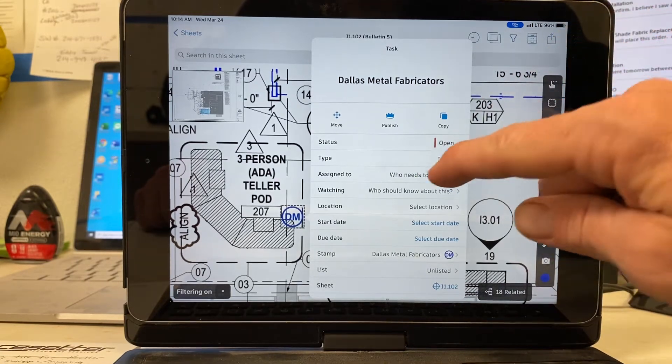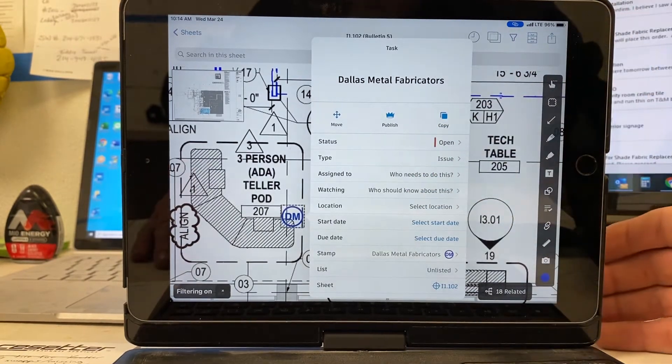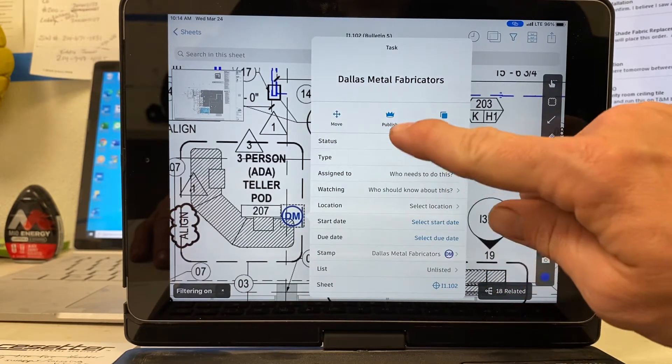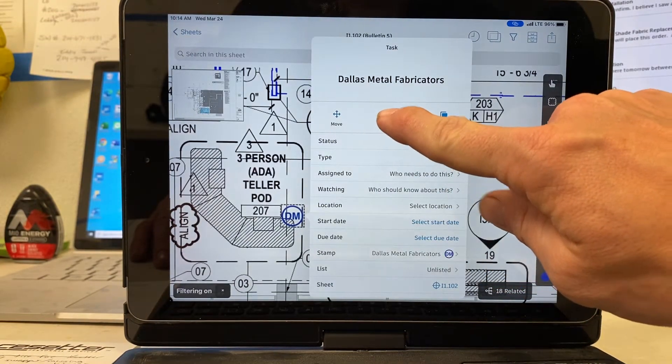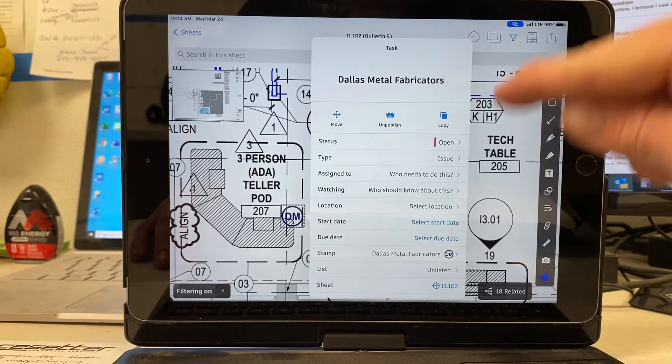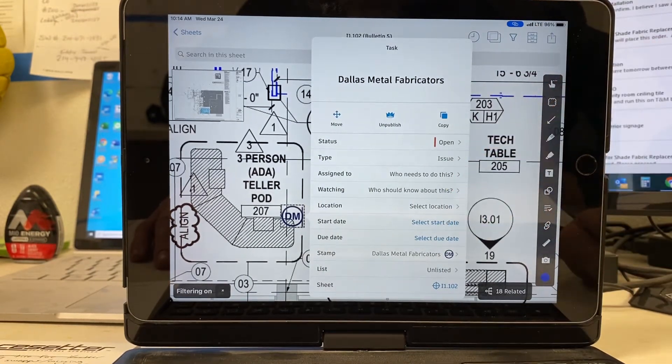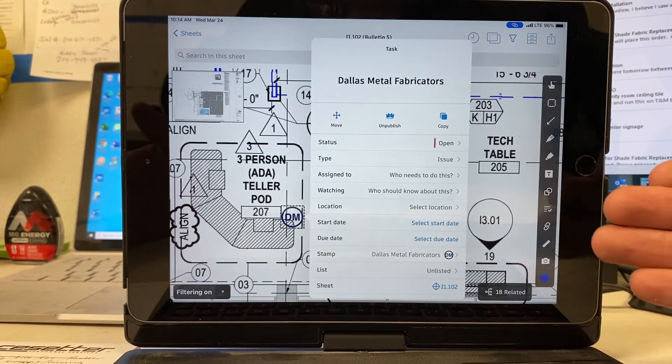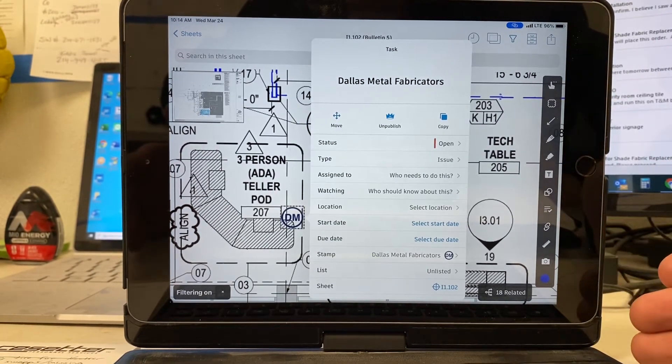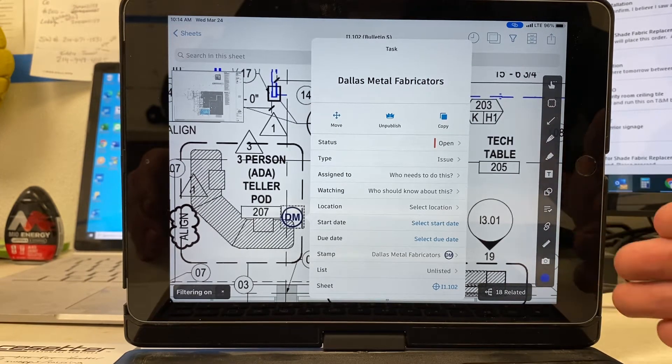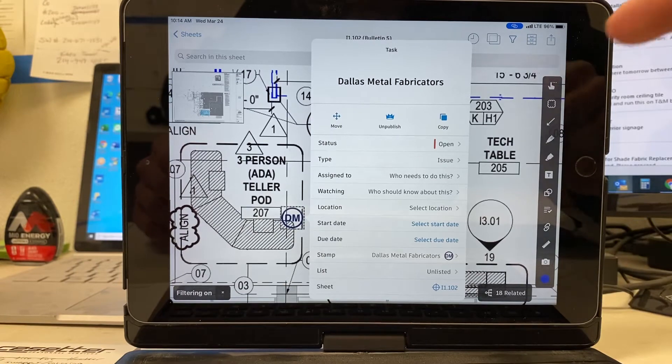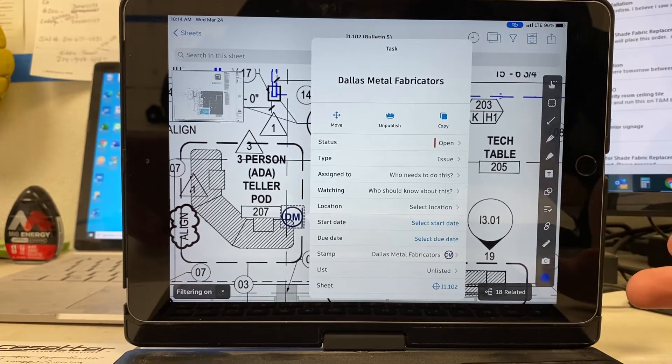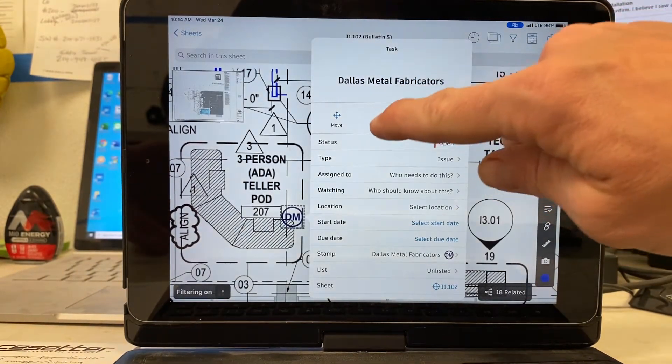And this is an important part. When you come through here, there's a few things you want to do. The first thing you want to do is publish this. You're going to click publish. That's going to make it to where your project manager can see every item that you put on here. If you don't publish it, what will happen is you are the only one that can see the list. And you're going to have to go back later after you do all of them and publish each and every one. And it can get confusing and you can miss them easily. So make sure to hit publish.